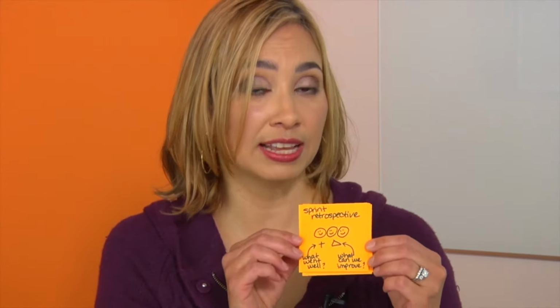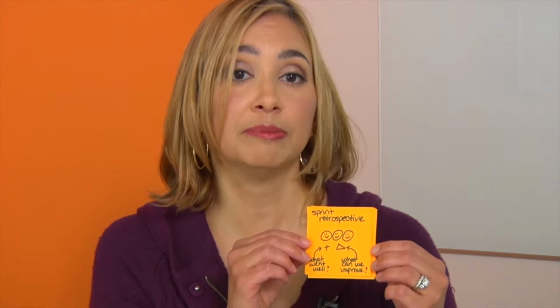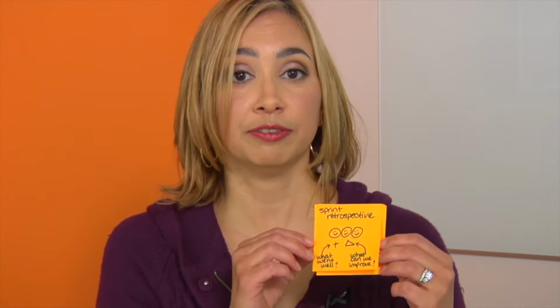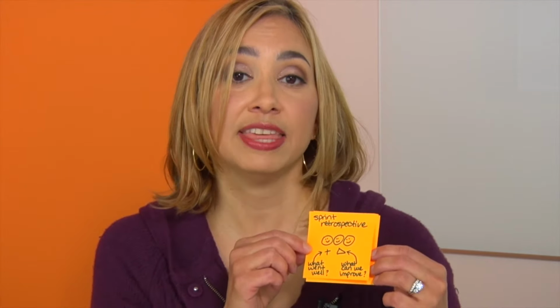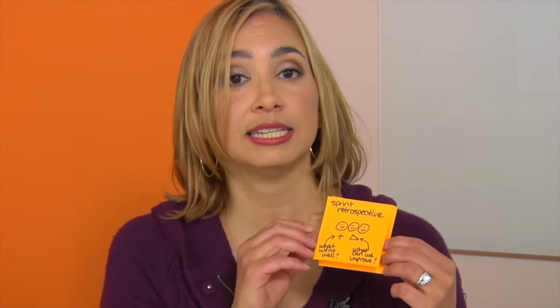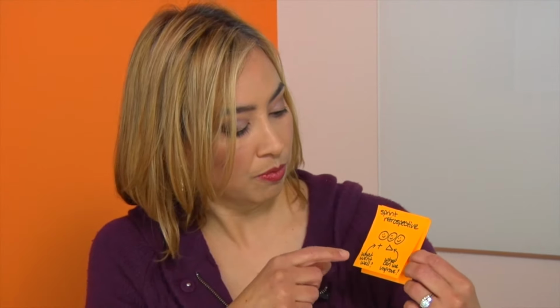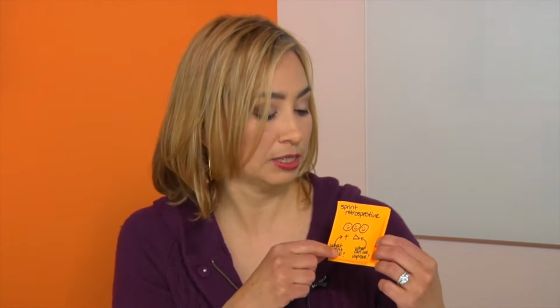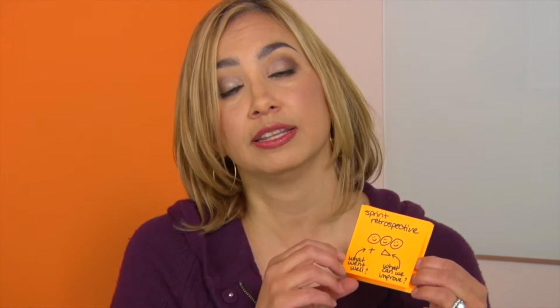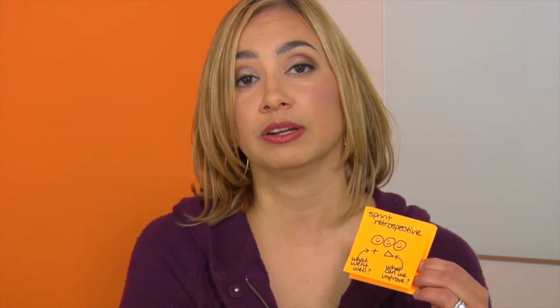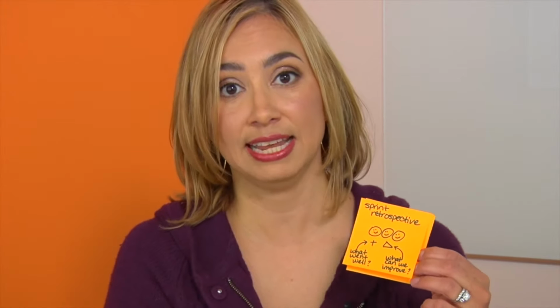And then the very last thing that happens in a sprint is the Scrum team gets together. So if you remember the 3 roles, the Scrum Master, the product owner, and the development team, they get together by themselves as a team and say, what went really well? What do we need to make sure that we continue into the next sprint? And then what can we improve? Maybe where are some of the deltas? What are some of the gaps? And let's maybe pick one of those things or a couple of those things to work on in the next sprint so that with each sprint, we're getting better and better as a team.